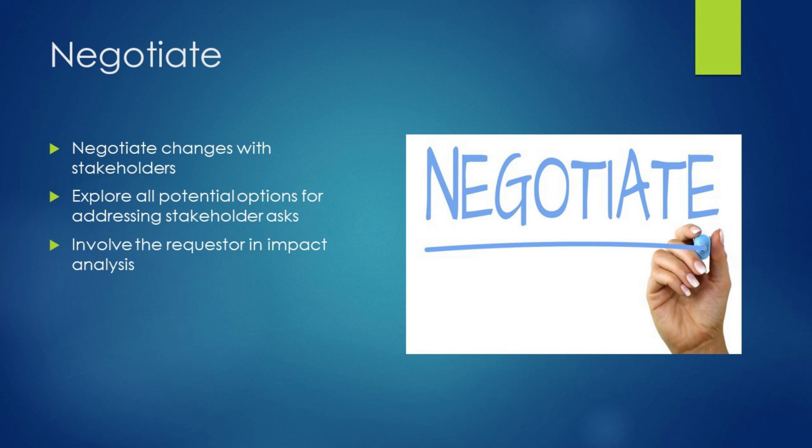Alternatively, if the requester isn't the project's sponsor, ask them to discuss their proposed change with the project sponsor to get their input before you spend time analyzing the request. Another option is to explore alternative ways to build in what the requester is looking for in a way that wouldn't have a dramatic impact on the existing scope. Number 5.